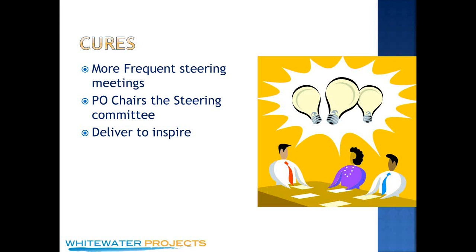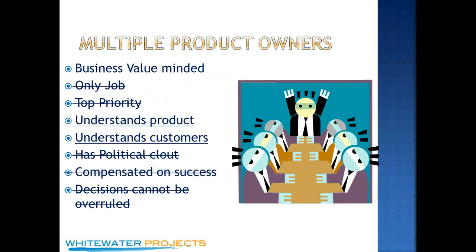Have them attend the daily stand-ups, or at least, and I know people will balk at that too. What? Product owners shouldn't be at the stand-ups? Yes, they should. They shouldn't be telling the product team what to do, but the product owner should be at the stand-up, because there are so many questions that can be immediately answered if the product owner is sitting there, right? And you don't have to waste your time going, oh, that's a good question. Let me go talk to the product owner. No secondhand telephone tag going on. Product owner's there, they answer the question, right? So try and have them meet more frequently.